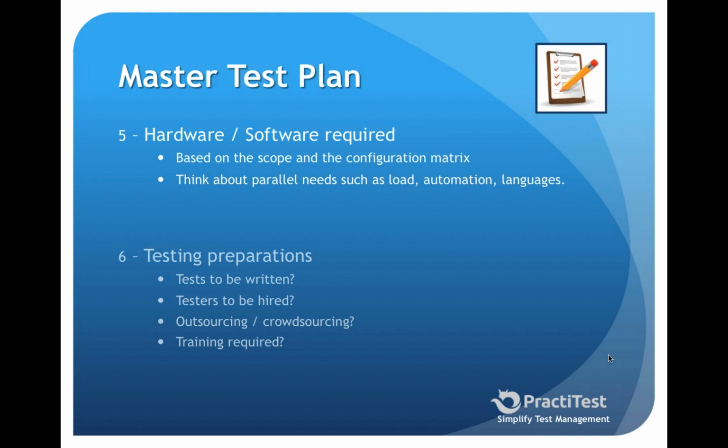Now, if we're talking about preparations, then there's also testing preparations. Think about, you have a set of test cases, what other tests do you need to write? Sometimes you need to hire new people. You're going to be working on systems that you haven't worked on. Maybe your company is going to be outsourcing or crowdsourcing. Even if you're going to be outsourcing or crowdsourcing, there's a big lead time for that. So plan ahead, make sure that you have everyone in-house. You selected your crowdsourcer. Do all that up front so that you're not going to be running late.